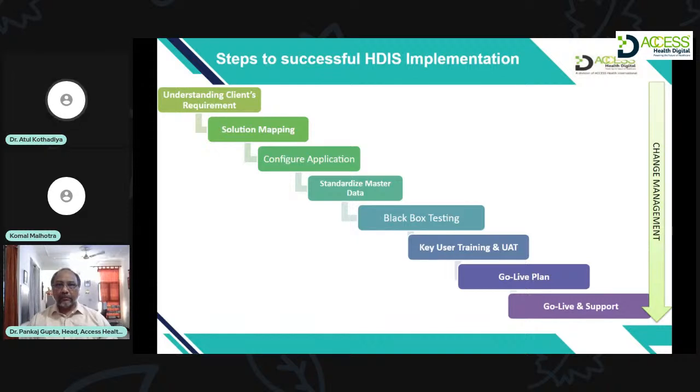There is another thing called parallel run. Parallel run is basically, on the date of go live, you start using the new system. At the same time, you are also making entries into your old system, and you take into consideration whether the outputs are happening correctly or not, whether discount is properly done, whether the reports are coming out correctly from the new system. So everything is getting validated during parallel run. Of course, parallel run has got its own limitations, because users have been using the old system for long, and so they are used to it.